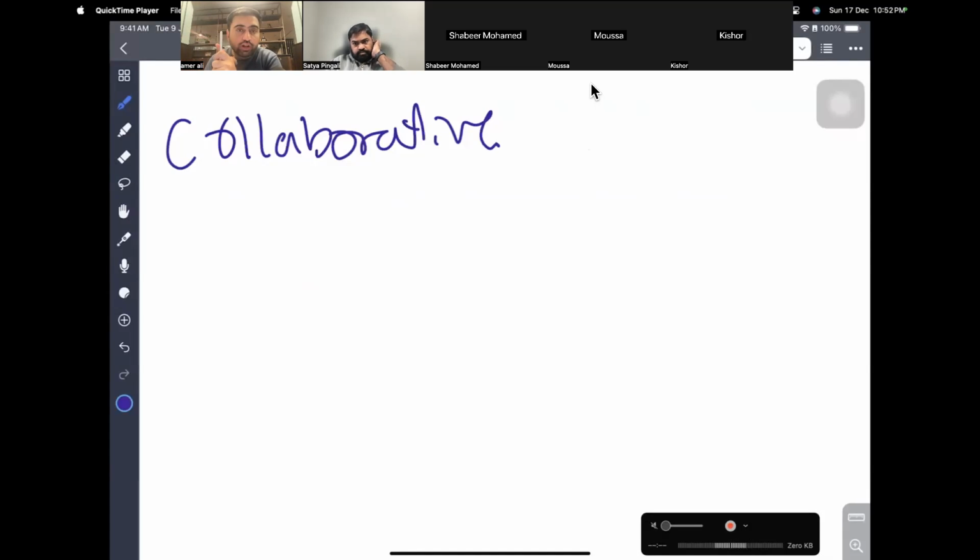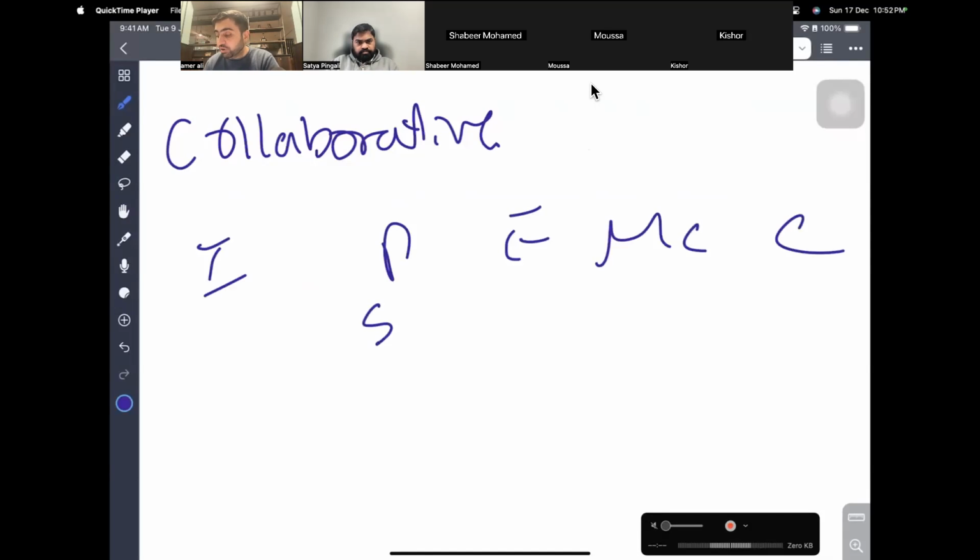We have made a stakeholder plan and a communication plan. We will implement them across initiation, planning, execution, monitoring and control, and closing. We make the stakeholder engagement plan. We will implement that plan in execution. We will compare against that plan in monitoring and control. And if something needs to be changed, we will update that plan.